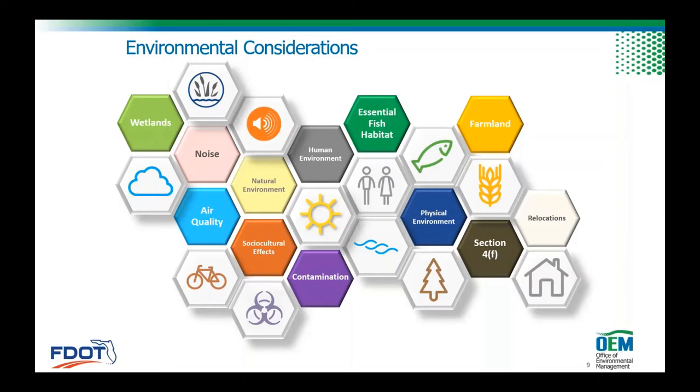For instance, in the screening events themselves, when we put in a purpose and need, and we digitize the line work, and we put in polygons, and we develop what we call PEDs, which are preliminary environmental discussions, which actually map really well back to these environmental considerations, our own transportation team and our consultants look at the proposed line work and where it's going to fall and what resources it's going to impact, and we actually develop our own preliminary environmental determination.